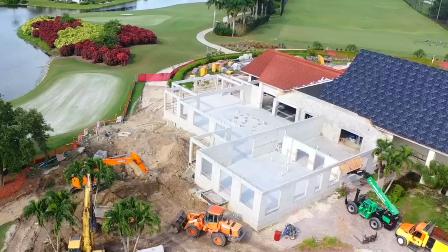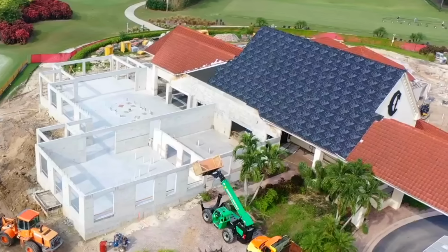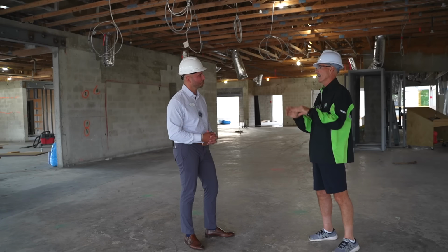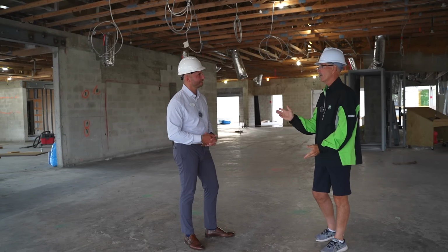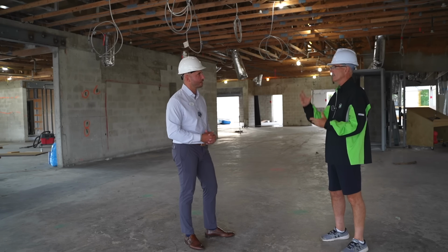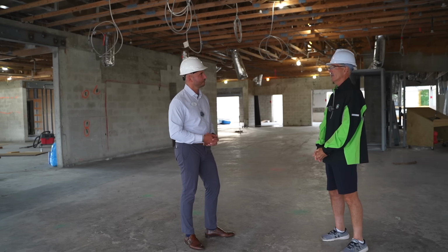So, because I questioned the contractor as well, our CM, I saw there was one section of roof that all of a sudden the whole roof was clear. Half the portico there, there's really no work there, but it is continuous, and there's a new wall and parapet framing into that. So it's probably short dollars for them to just take the old stuff off, reapply a waterproof membrane. Good for us. Absolutely. We basically got a new roof in some areas where we thought we were just sort of patching. So yeah, absolutely puts us ahead in those areas.